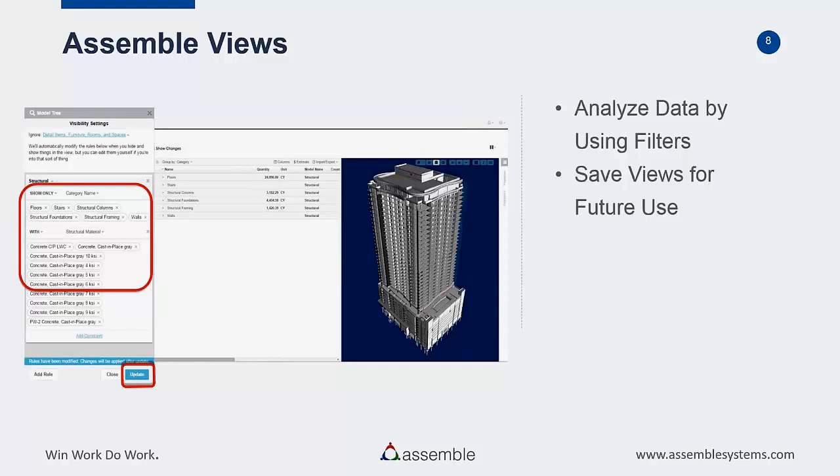We broke things down like, just show me all the concrete. Okay, that was one saved view that we created for them. Just show me all the glazing on the building. Show me some of those big picture items that have a high value towards the job and drive the cost of the project. We were able to save those views and then utilize them every time we published the model,